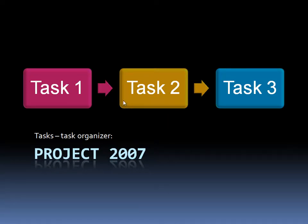Meaning that, for example, I cannot start task 2 unless its predecessor, task 1, has been completed. This would make sense in this project because if I haven't researched anything, then I have nothing to write about.